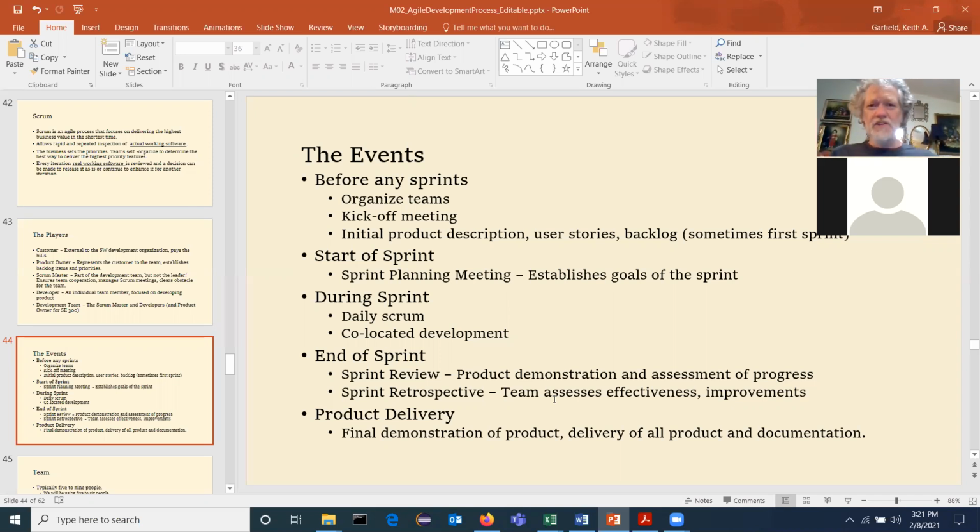Now, what happens if you have a user story and it didn't get done? Chunk it back into the backlog. So you can take user stories and, oh, shoot, we wanted to get to this and it just didn't happen, or it's partially done. If it's partially done, what you do is you create another user story about the remaining part, and chunk it into the backlog.